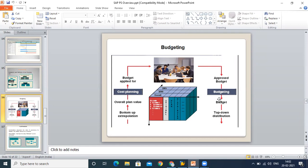When we talk about budgeting, it is simply planning your financials according to your need. Here we can allocate budgets at different levels. Generally, budgets are allocated at the WBS level, the Work Breakdown Structure level. Suppose I have one project—in a construction of a building, I want to monitor the cost for different expenditures like civil work, electrical work, and plumbing work.